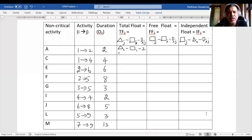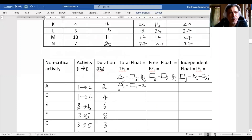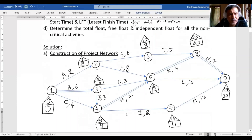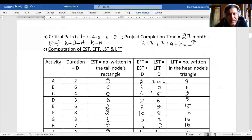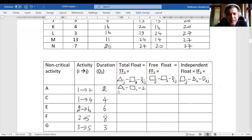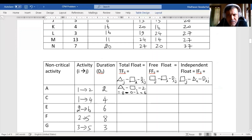For activity A, which is node 1 to 2: total float = triangle_2 minus rectangle_1 minus duration. Triangle 2 is 8, rectangle 1 is 0, duration is 2, so total float = 8 minus 0 minus 2 = 6.